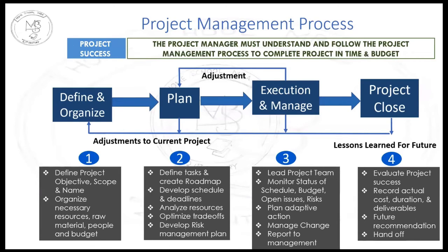And you sign a proper letter of handing over, and the client takes over and gives you confirmation that yes, the project has been completed according to his requirements and according to specifications and all that. And that documentation now becomes one project completed. Similar projects, you have so many of them in your racks, and every project is used for future planning and for learning lessons from the past. That is, generally speaking, what project managers should do. Yes, if you have any questions.